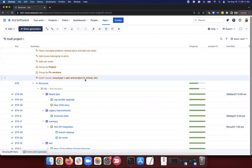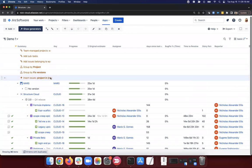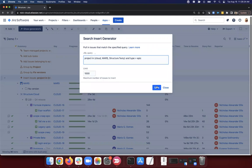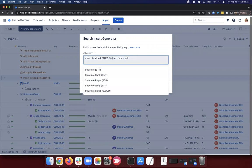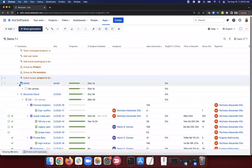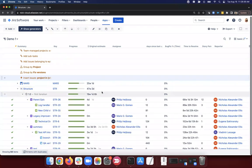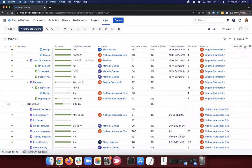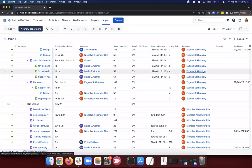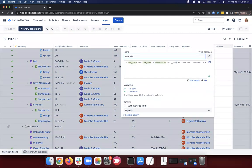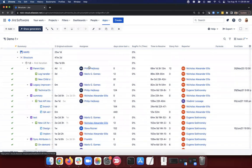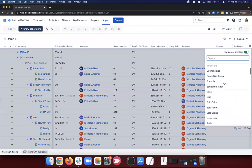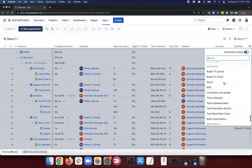Formulas can be a little difficult to write on the fly. Let's switch to easy mode — at the bottom we have a section of calculated columns. There's the RICE column and the WSJF column. For Weighted Shortest Job First, we need to define some fields. The template gives a fully working formula with comments explaining what's going on. My marketing value has a marketability field, and depending on whether it's medium or high, we give them different values. Same with the impact factor — we're translating these strings into numbers to calculate the value.